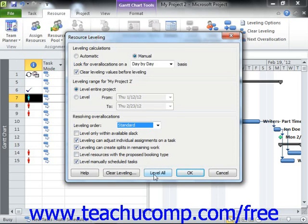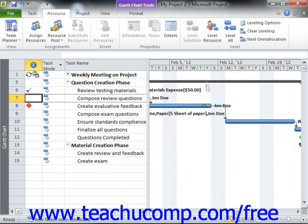Next, click the Level All button when you are ready to level the entire project file. Doing this corresponds to clicking the Level All button that appears in the Level group on the Resource tab in the ribbon. Also note that you can choose the Level Selection and Level Resource buttons in this same button group to level a selected task or resource within your project file if you wish to manually level resources one at a time.